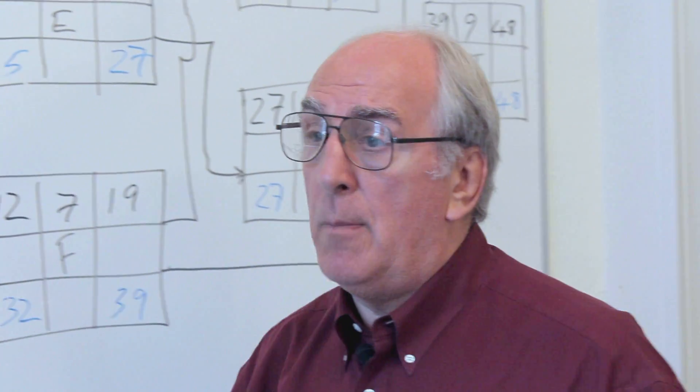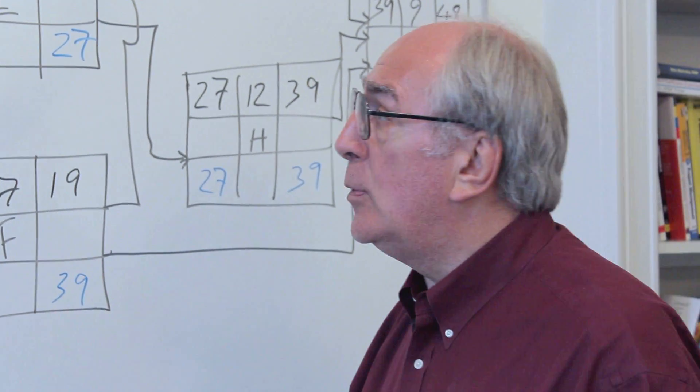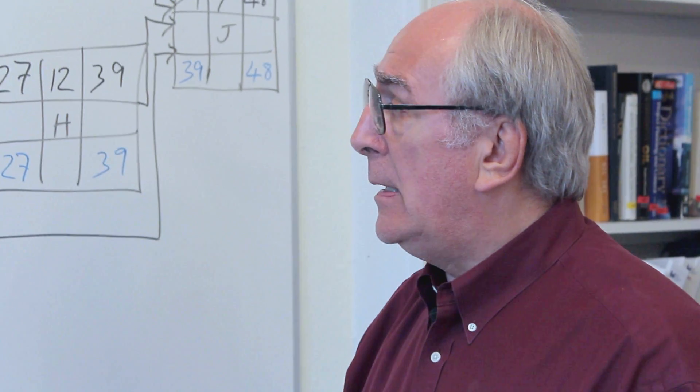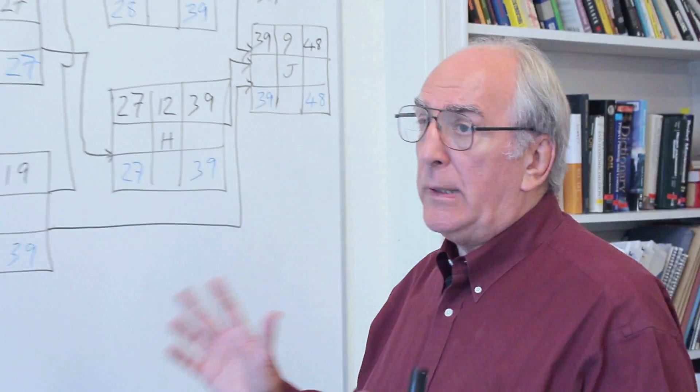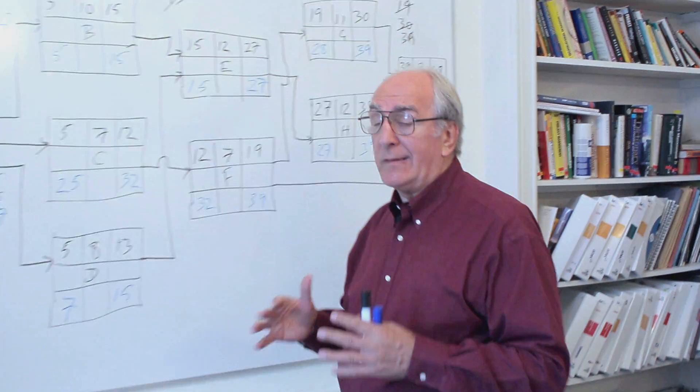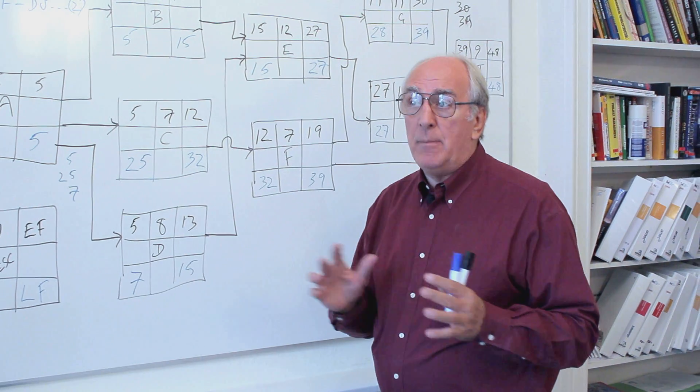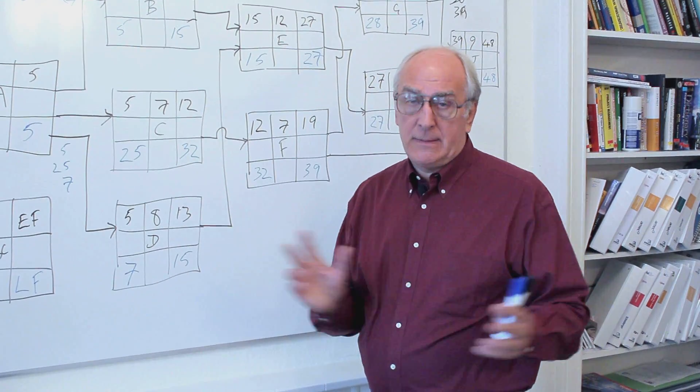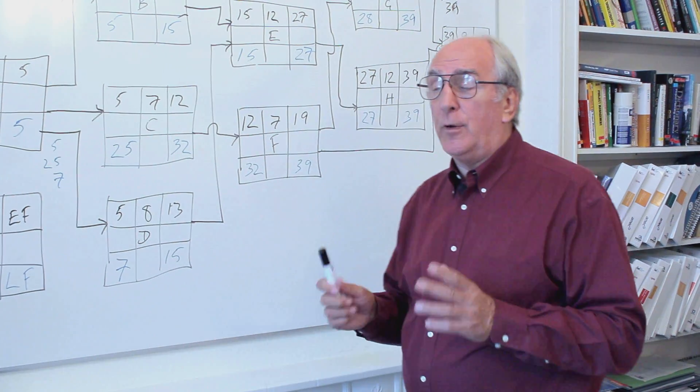So this activity has got a more important quality and you're beginning to get the idea of where this word 'critical' comes from, because these are critical activities. So the property we're alluding to has been known over the years as slack and is now more often known as float. It's the amount of time contingency that exists on any activity, the amount of movement in time that activity can have before it affects the end date.